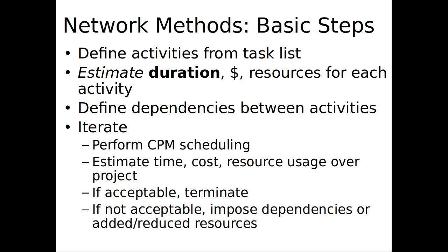In this case, we're confining our attention, again for simplicity, otherwise it's going to require several lectures, to a case where B cannot be started and C cannot be started until A is finished. In general, and I've taught versions of this before, we deal with start dependencies or finish dependencies, start and finish, or finish and start. You can have all four. Here we're only going to confine our attention to the ones where B and C can only start once A finishes.